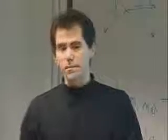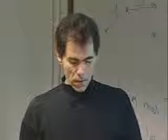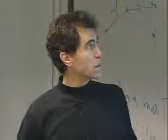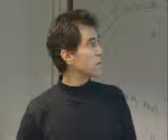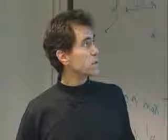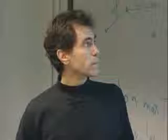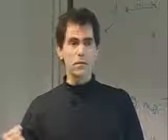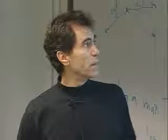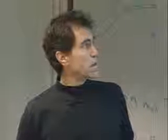And here's the concept. And of course that concept changes over time as you get new technology, etc. And so that's exactly what happened here. We did get approval 10 years from when the original concept started. Authority to proceed for the prime contract was in January 1989. What this means is that that's when we hired a contractor to build the spacecraft. And the start of that process is called ATP. We had two separate ATPs.